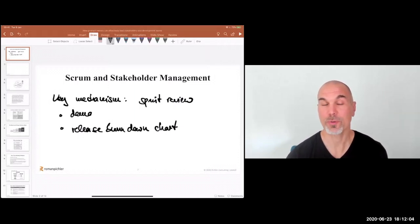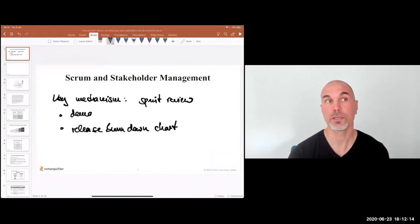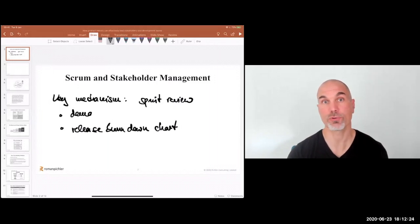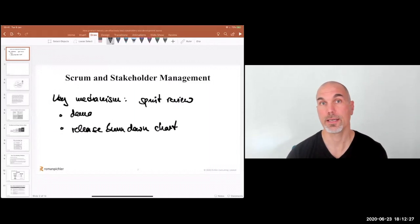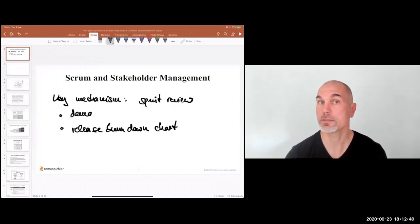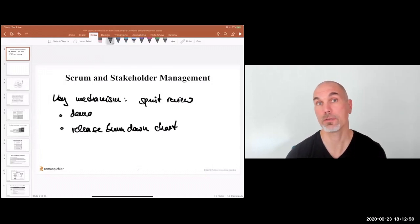Of course, it should be the product owner who has the final say. One of the issues with collaboration and collaborative decision-making is the mistake of either choosing the opinion of the most senior person in the room or trying to agree on a vague compromise. Neither is usually a recipe for success. What product owners should do is listen to stakeholders, understand their underlying needs and concerns, but then decide in a second step what pieces of feedback to take on and how to action them — or maybe not to action them.